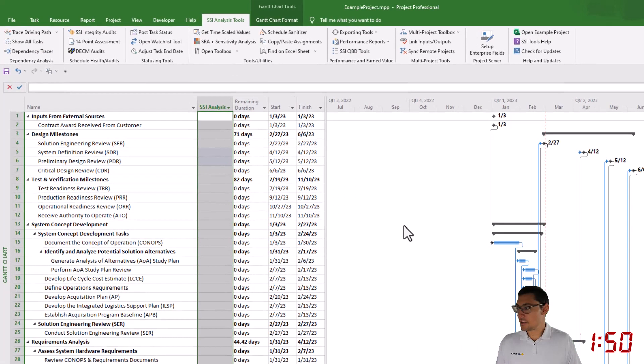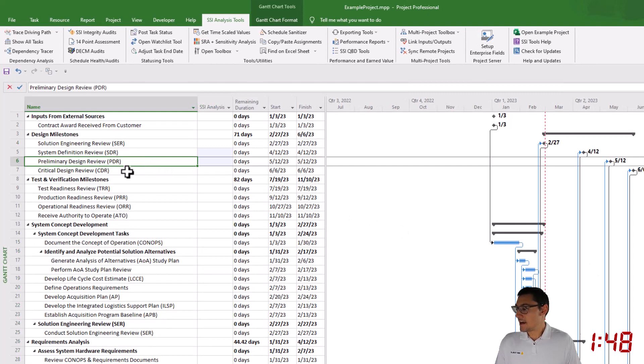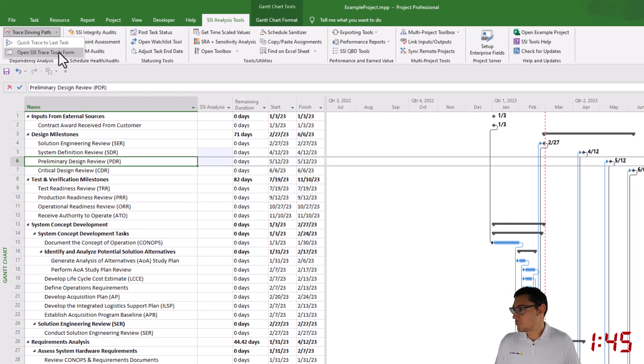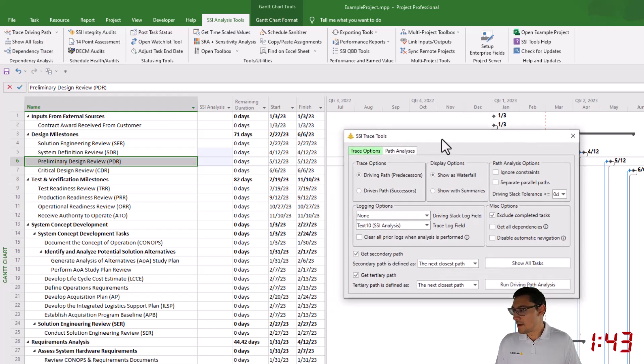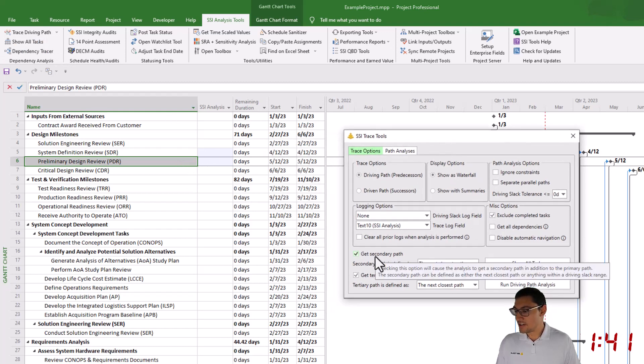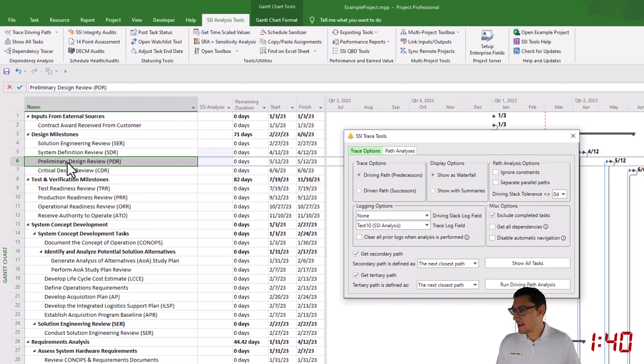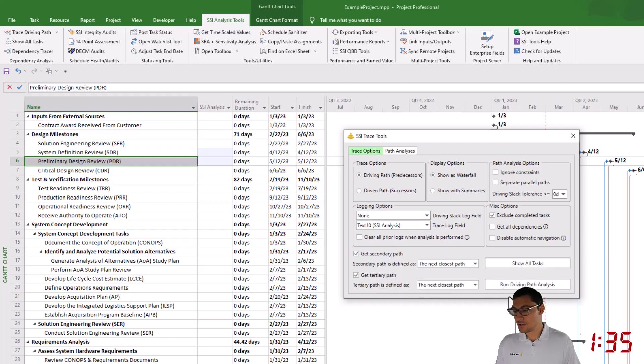Next, I'm going to go to Microsoft Project and I'm going to use the SSI Trace Tools to get a primary, secondary, and tertiary driving path analysis to this Milestone Preliminary Designer View. Do that by checking these two options here.